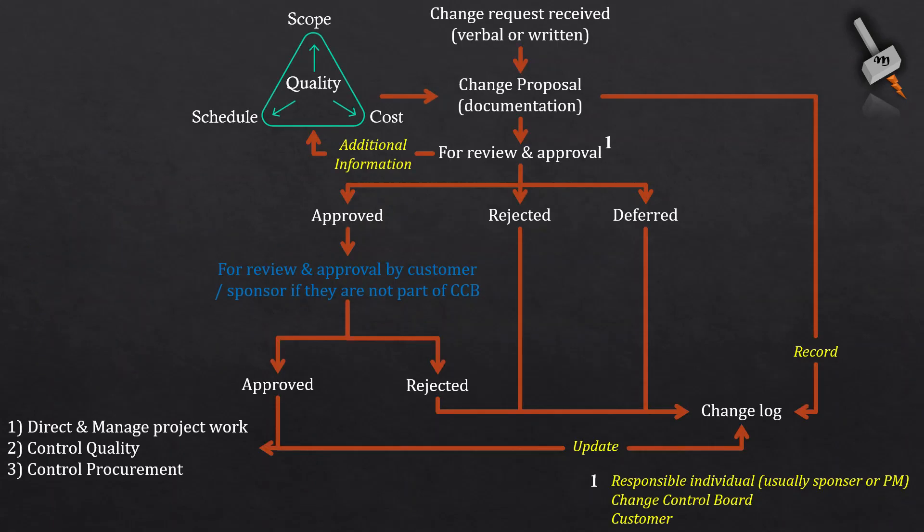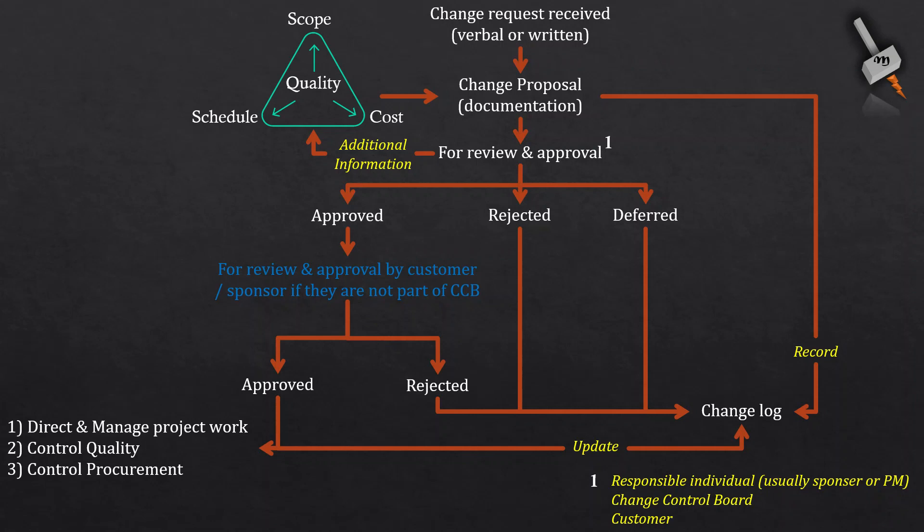Post to the change, the project manager does an impact assessment, updates the change log, and puts the detail in the final project report. So, this is the process of change management in projects. Similar approach can be adopted in operations or business also.